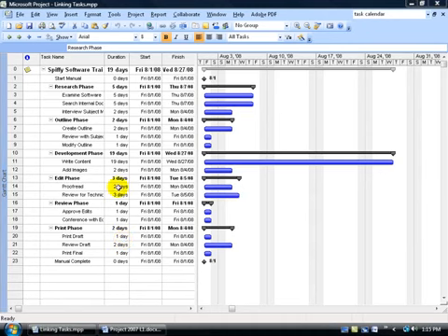Now the purpose of this training video is basically to link your tasks together, but keep in mind in the background, by default, these tasks, when they're linked, are going to have a relationship type, which is going to be finished to start. We'll cover the relationship types a little bit more, in fact, how to change them once they're defaulted in the next training video.